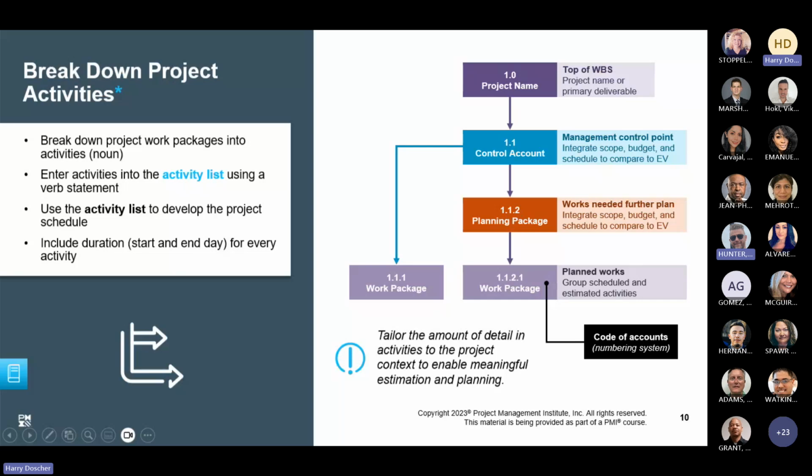Tailor the amount of detail in activities to the project context to enable meaningful estimation and planning. Meaning, you may need to get into more detail if it's a new type of project that you're working on or putting together, as opposed to something that is really a copy of a project that's been done before by the organization.